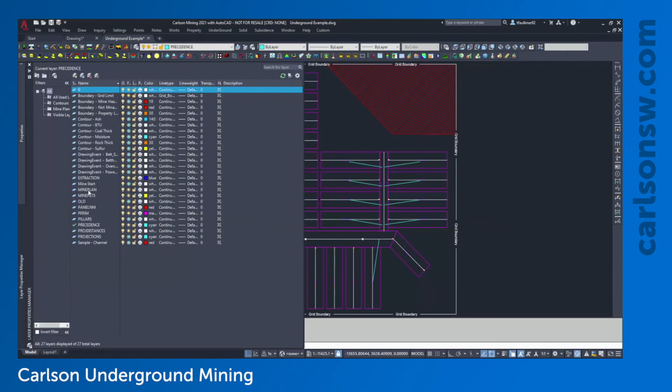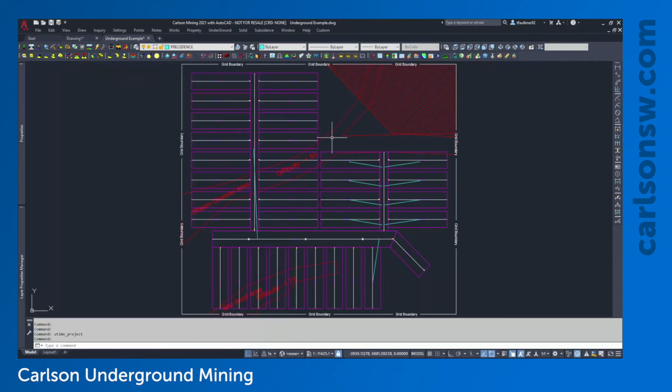I'd mentioned in an earlier video that I have some mine hazard areas. So we've got a string channel that we've kind of mapped out, and we expect that when we're in that area, the difficulty is going to be a little bit greater. So we're going to slow our production down by a factor of 1.5. Over in this area, we also have another reason to believe that we're going to have bad roof. So we want to use a difficulty factor of 1.75.